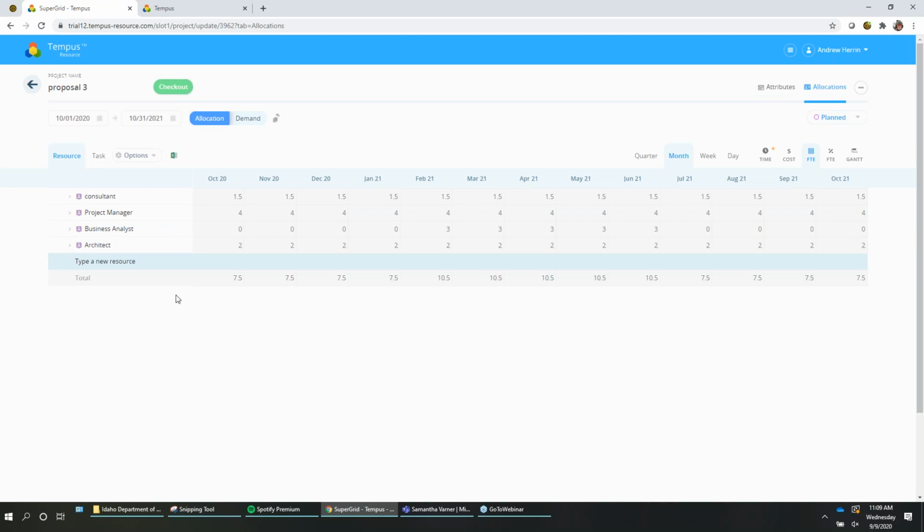So again, a good best practice that I see quite a bit on these proposal projects is adding these demand planning resources. So this is very useful, again, like I mentioned, for road mapping for the next year, whether it's the fiscal year or the calendar year, but then also being able to go in and long-term forecast, even when it isn't a giant exercise going over a roadmap. If you're only looking at a couple of projects in the near future or even in the distant future, to come in and utilize the generic resources, whether again you have it as a skill set or a role type resource, to come in and forecast. And I'll show you how this will operate here in a second with other parts of the system.